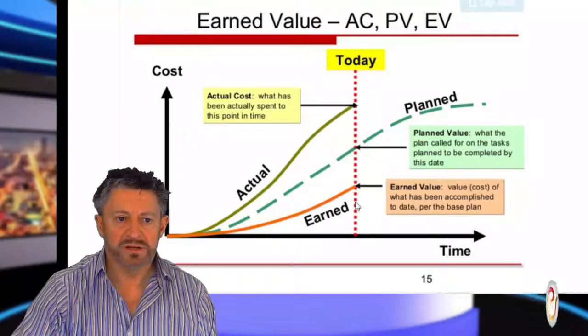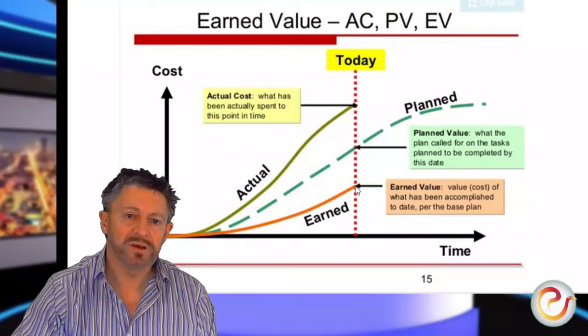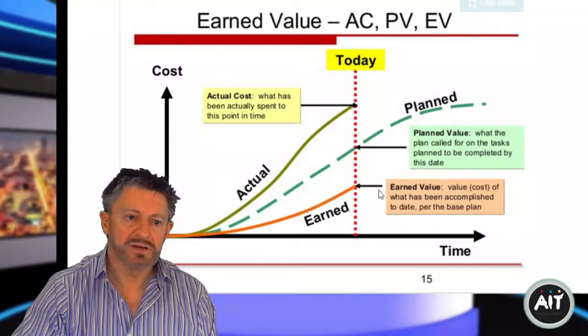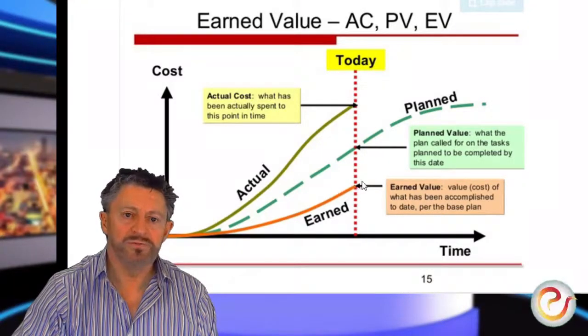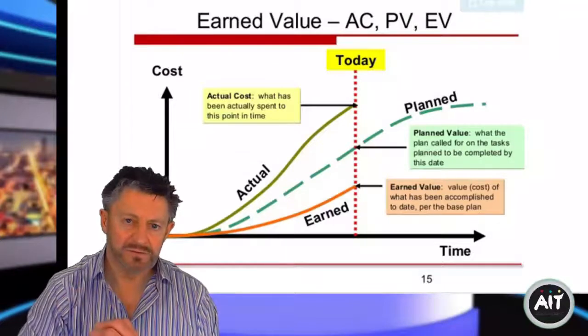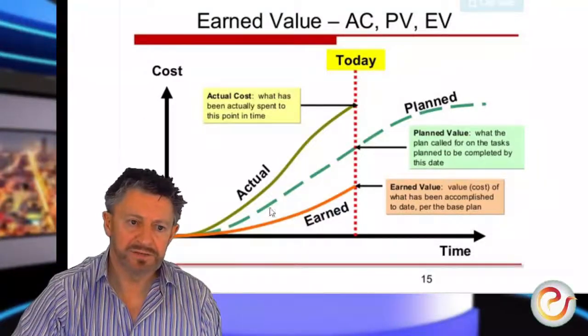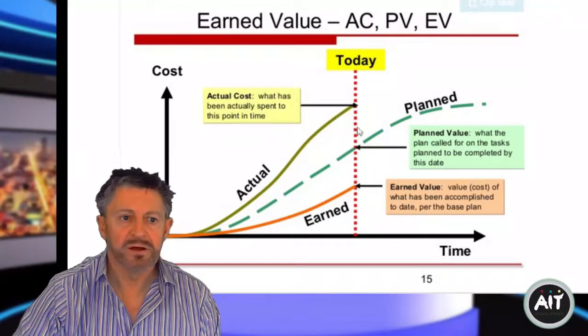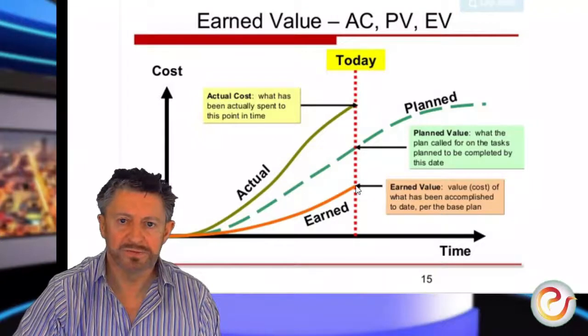So based on, at this point, I might say, well, I haven't got all my activities complete. So the activities that are only completed, I should have had more. Therefore, I've undervalued. In other words, I've only earned less value. So activities down here, costs up here. So I can see that I should have had more activities done. I've overspent and I've underachieved.